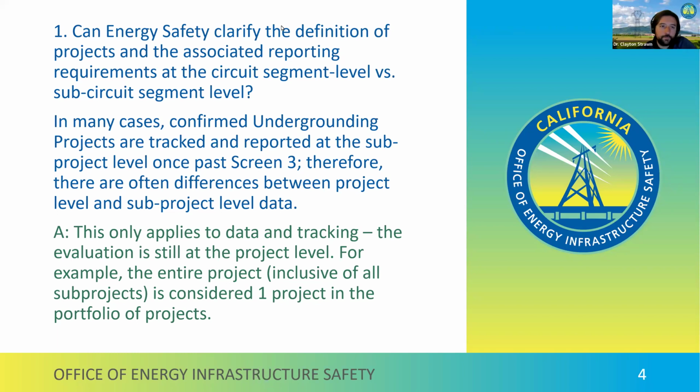Yeah, exactly. My point is that the screens themselves are going to be applied at the circuit segment level. They're all about risk and modeling, which we understand are done at the circuit segment level. So any sub-projects wouldn't be passed through the screens on their own. They would be passed as a project, as a circuit segment. And then the lower level stuff, when it has to do with permitting or construction phases, we might be able to build that in, and that would be something we'd appreciate written comments on when those are submitted.